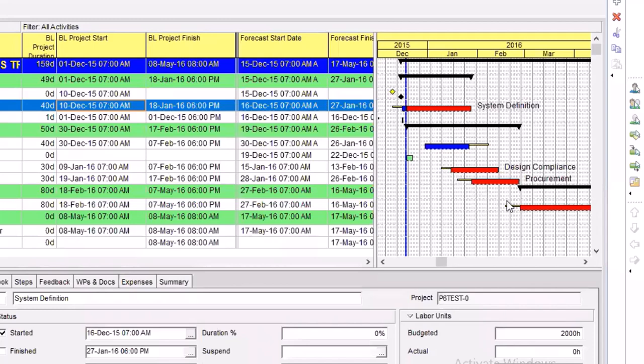You're having future delays here. So that's why I said future delays, the money maker. This is the one you start sounding alarm and telling them that, oh, see where we are, see the delay we have here now. The only way we can recover is to maybe increase people so that this job will come back early. Make sure we finish this one on time so that the 5 days we lost, we might recover it. Because this is already future delay.